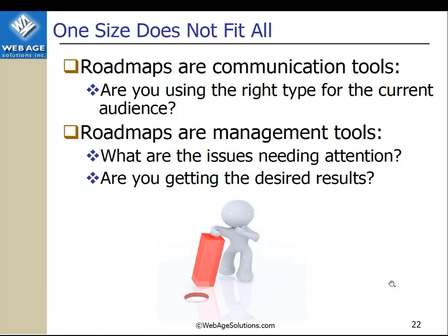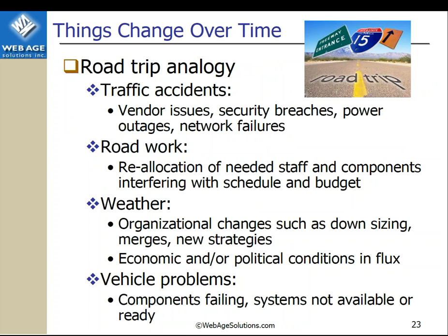And then, of course, that does mean that roadmaps are asking for ways in which to measure that you're at a certain point. If I put a transition architecture in place, I'm actually labeling that when we're here, we expect to see A, B, and C. And this is what A, B, and C will look like. This is what A, B, C will do, right? So we have the experience there and the way to measure it. So it's enforcing the ability to measure it. So going back to gap analysis and traceability, we've got testability built into it, and we've got measurability. So not just one roadmap, but the appropriate roadmap for the kind of information you're looking for.